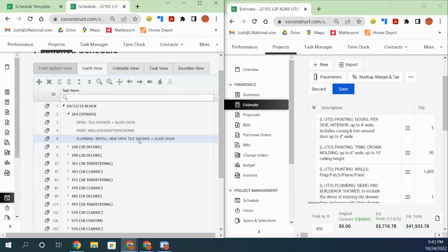So keep that in mind, and it's okay to make changes to your schedule as long as those changes are communicated to your owner, the client, and your community during your OAC or MEMO calls. And I'm sure they will expect an explanation, but it's understood that schedules move. So enough about that. Oh, that fact is definitely something that you mention during your pre-construction meeting with the owner and the community.